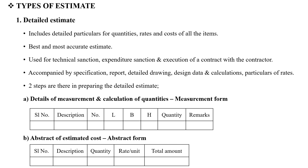This is the Detailed Estimate. In every square mark, the Detailed Estimate will be used. When you need the most accurate estimate, you can use a Detailed Estimate. This can be used by a Contractor, as well as for Technical Sanction, Efficiency, or Contract Execution.